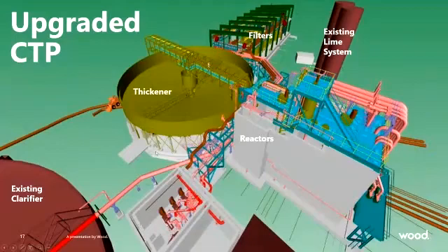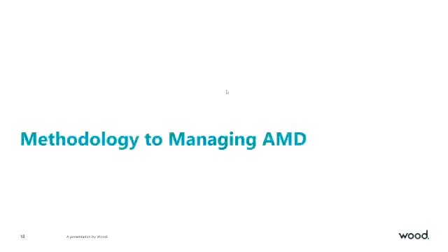So we had to come in and build big 125,000 gallon concrete reactors, 2 of them, the rapid mix tank, the new thickener, and new filters in the background. And the filter building is sitting right on top of that old polishing pond that I pointed out previously. It's a pretty tight workspace.